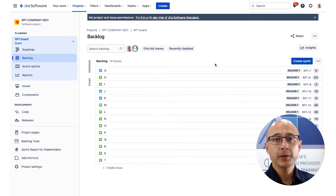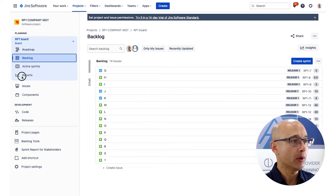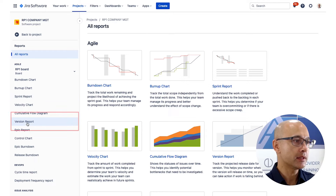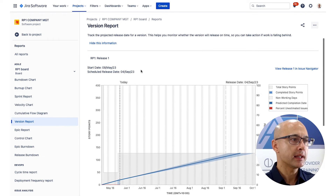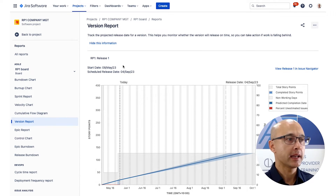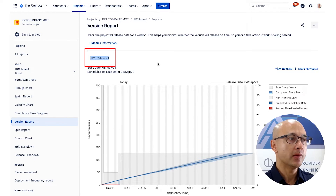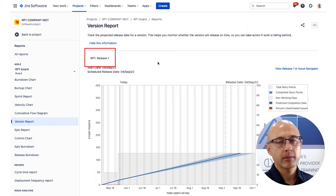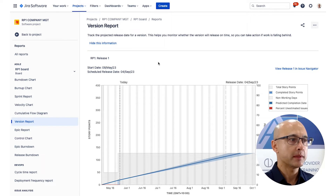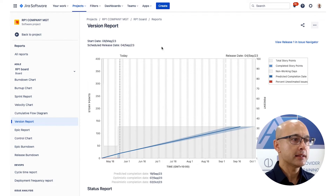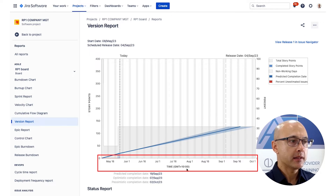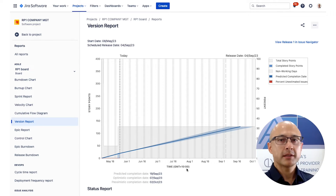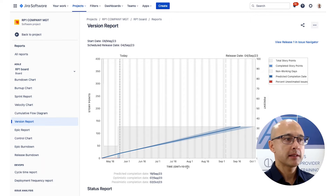Firstly, how do we find the version report? We click on Reports in the left panel and you'll see it's listed just below — this is what you'll see. The first thing is to make sure you've picked the right release, listed in the top left corner. If you have multiple releases you will see a dropdown. You can see the dates of the release presented just below it. The report shows story points on the left and time at the bottom, so it's showing you story points completed over time.